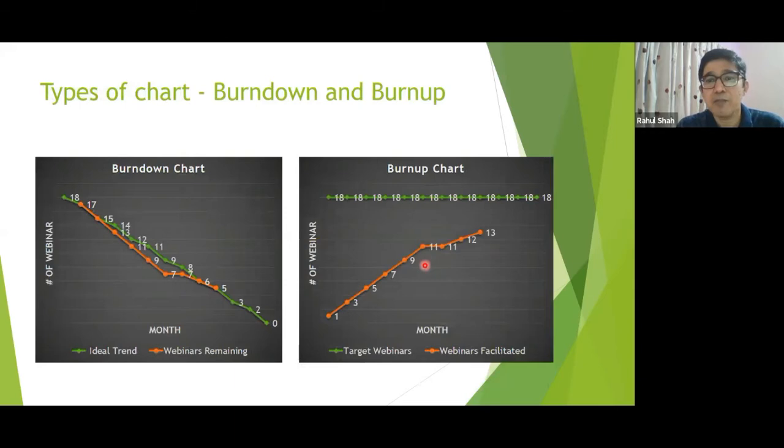So the burn up chart, you can see in between as well, right? The most important thing in the burn up chart is what your original scope is and the changes in the scope. Here we are not showing any changes in the scope. Let's consider the team is doing good, right? Maybe some stories were removed because they are not applicable now, that's why the team is doing good, I don't know. But if there is good progression and I see that the scope has been reduced, then I will come to know. Similarly, if the scope has increased, you will see something like this.